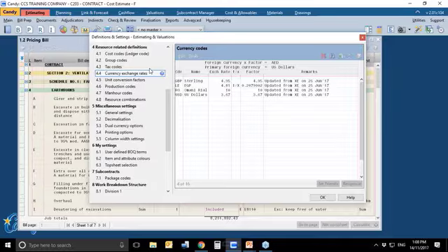And here I can see that we've already defined a few currencies. So there are your currency codes. The first one that we've defined is GBP for pound sterling, and the exchange rate, of course, is 4.95. 1 pound sterling is 4.95 AED. The factor is the value which is used to convert your foreign currency back to your base currency or your pricing currency, being AED.